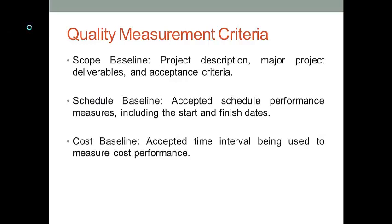The next two important documents you need to consider are the project schedule and the cost baseline. You want to figure out when each activity should be completed, how much money can be invested in each activity. The time factor and cost factor are very important. You could raise a very high requirement on quality, but if you cannot complete your project on time, on budget, your high requirement would be just an unrealistic objective. So when you develop the quality measurement criteria, you need to consider the project schedule factor and the cost baseline factor.